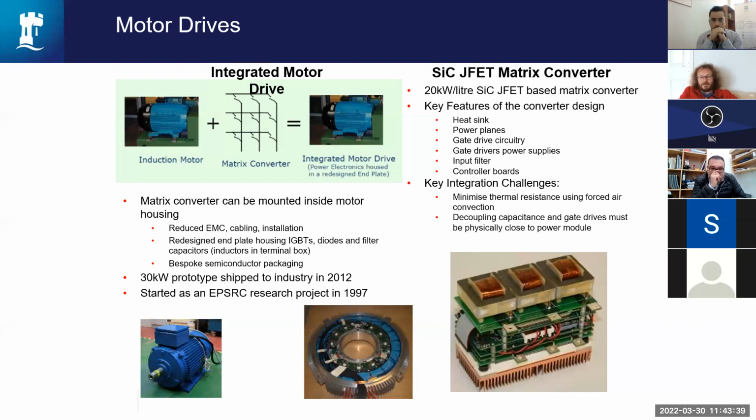So that's also very typical in engineering, that the further up the technology readiness level you go, the more different types of engineer you need to involve in the project. So in that project, it wasn't just about electrical engineering, it wasn't just about power electronics. We had to deal with the mechanical integration and we had to deal with the thermal management. So we had to be an expert at electrical machines, at power electronics, at thermal management, and in mechanical integration. So at least 4 or 5 PhD students for the basic technology, followed by a large number of years of research fellows and engineering time to put those products together. So these things always take time.